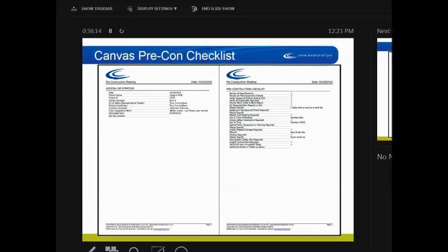I couldn't remember. So having it in the folder for the foreman, or having it in the estimator's folder and available, would have saved us some headache trying to find the details on how you overlap this, because you're going to forget, and they're all different. We certainly don't want to install it, dig it up, and pay all that money. So let's verify and make sure we do have the product data and SDS. It may seem like something that's not important, but it is.